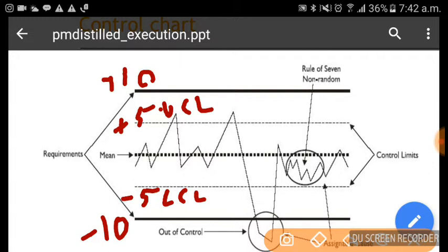Now, the first review we are here, no problem. Second review we are here, no problem. Third is here, no problem. Fourth is here, that means we have gone outside the organization's capability baseline. The customer may not complain, but at the same time our quality department can complain. So you do a root cause analysis and take a corrective action. And then again next year.